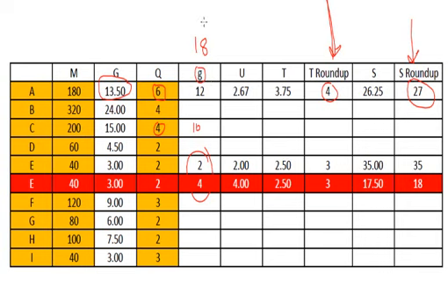So the main crux of this video is therefore little g, which you calculate by guessing. You guess what is the closest amount to big G. You've calculated big G, and now you know that the team size is whatever is in column Q over there, and just use a little bit of common sense. If I've got a team of 6, 6 times 2 is 12, 3 times 6 is 18, and 18 is going to cause a lot of wastage, so that's why we go for 12 over there. If you go with 1 team, you'll see that your duration is too long, and your project might run out of time.